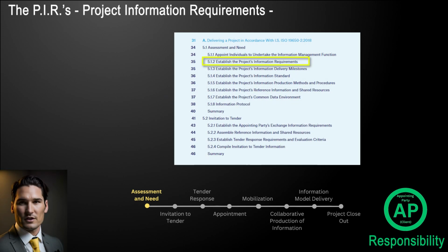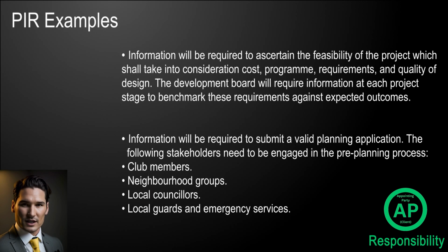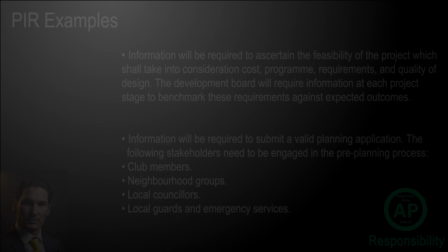back to this step. The Project Information Requirements, or PIRs, are high-level queries from an appointing party who want to engage with stakeholders and identify the required project information at key decision points. They are developed by the appointing party and are not included in the tender documentation, but it is likely they will engage with advisors or the design team for development. PIRs give an understanding of who needs what information and when within the appointing party. MAC provides a template if the AP requires assistance with this task.